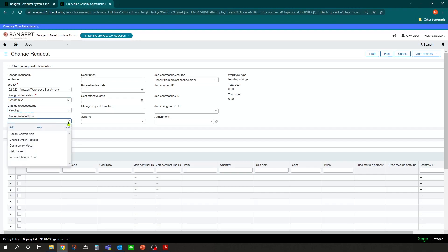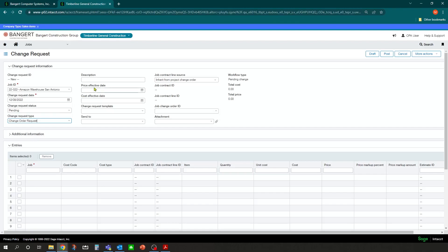So let's assume the change request came in today and it's still going to be in a pending stage. And as far as a change request, we'll fill out what type of change request it is. In this case, we'll just call it a change order request. And in the description, I would put a general description of this request and we'll say add additional 12-foot call it bay door.